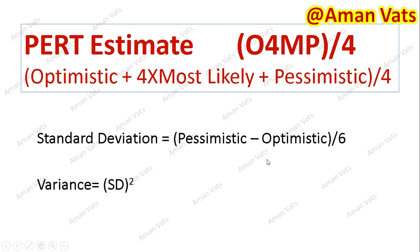Standard deviation is calculated as (Pessimistic − Optimistic) / 6, and variance is simply standard deviation squared. That is the PERT estimation formula along with its statistical measures.